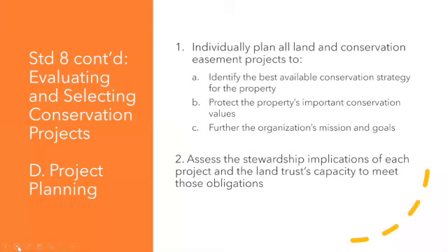So an improved property where you intend to take and manage a building. And maybe that education center also has 10 miles of trails with interpretive signage, yada, yada, project demonstrations, much more costly project, right? So project planning is really going to require a comprehensive look at what it's going to take you to steward that project.